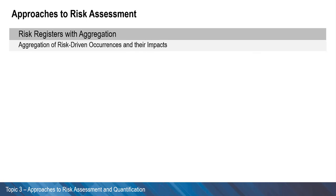The second approach is aggregation of risk-driven occurrences and their impacts. In this approach, the underlying nature of the risk is captured — meaning whether the risk happens or not. In general, simulation techniques would typically be required to capture the various combinations that may materialize. In such cases, while capturing the random risk occurrence, one may also wish to reflect that the impact of each item could be an uncertain figure drawn from a range of possible values.